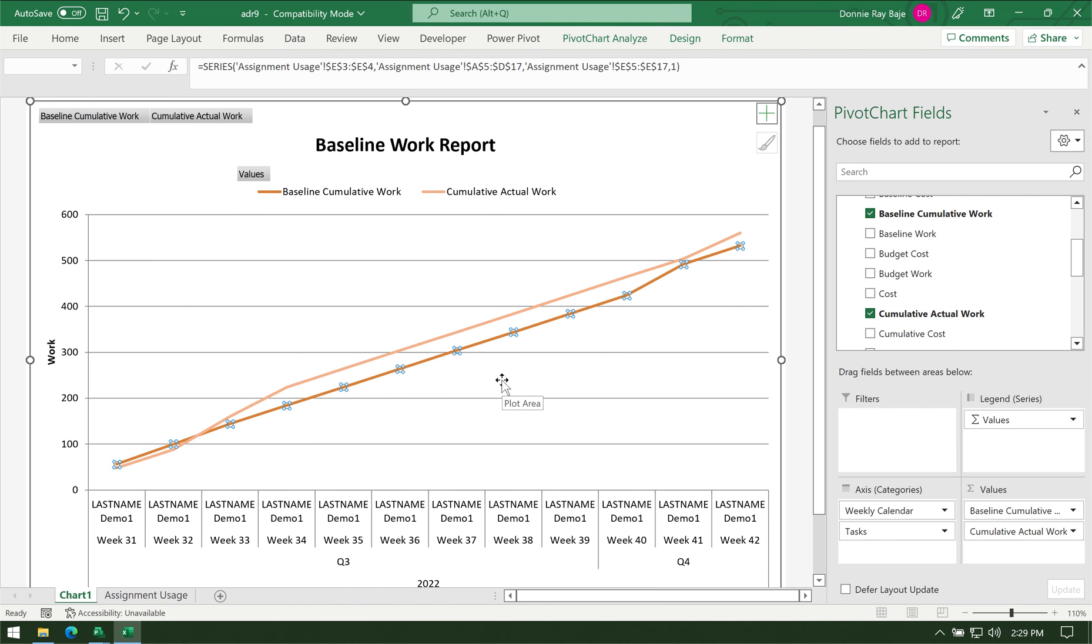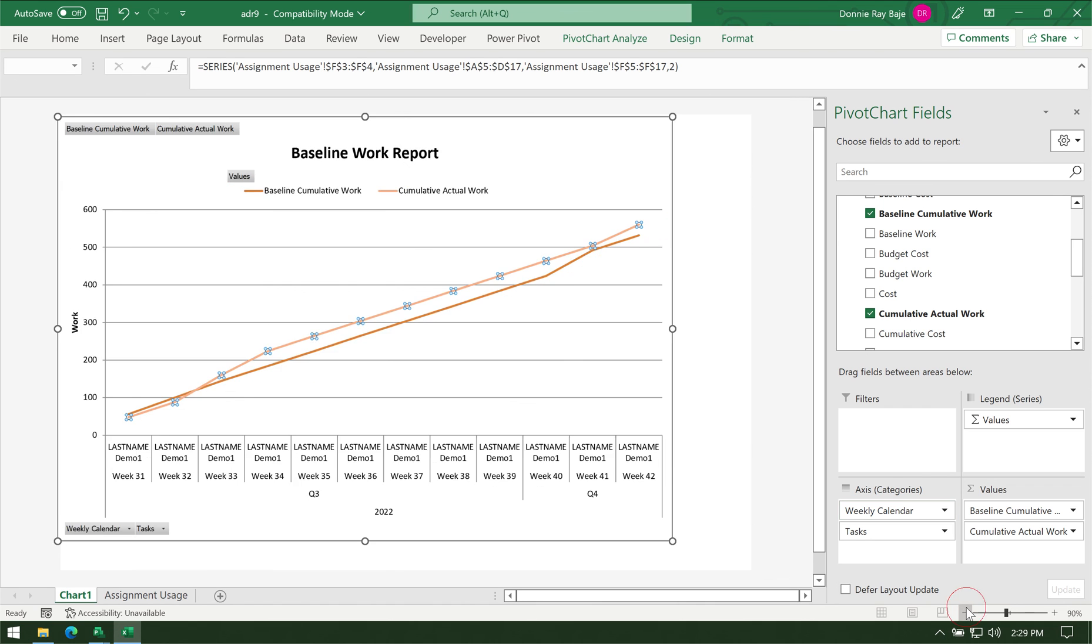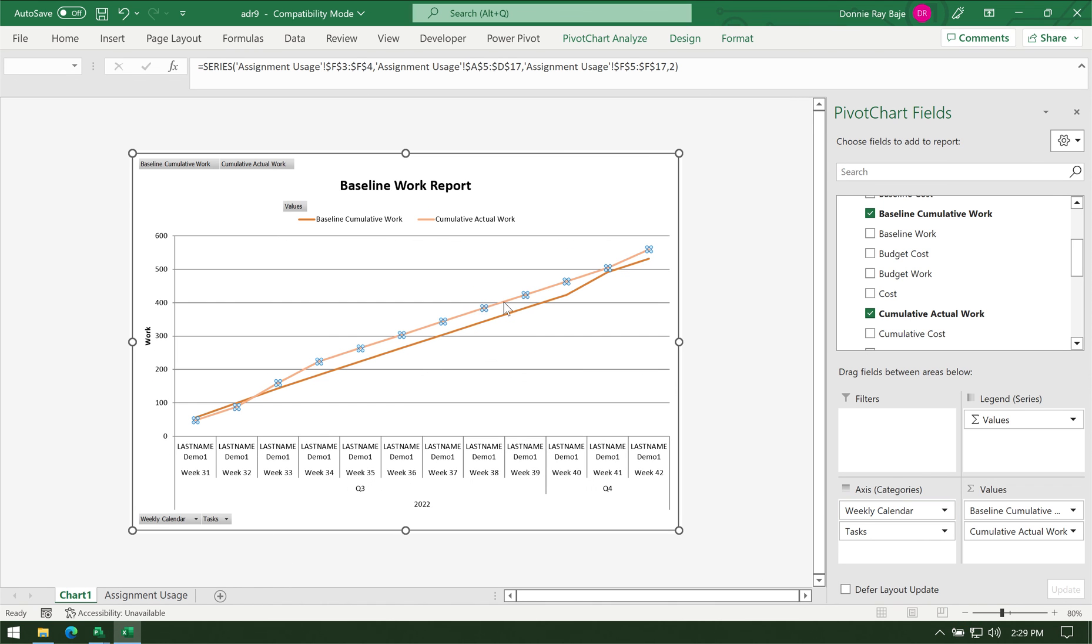You should see that the dark orange line is your Baseline Cumulative and the lighter shade is the Cumulative Actual. You can modify that if you want.